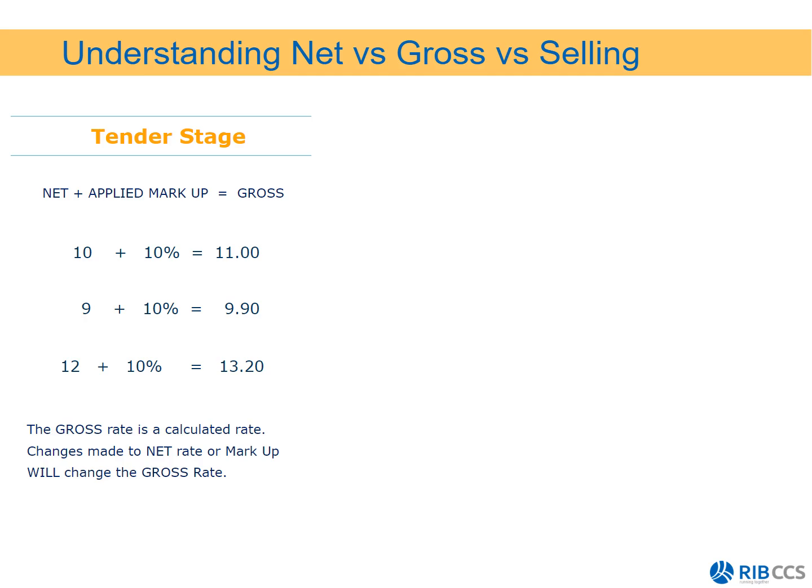Now, the gross rate, as I mentioned, is ideal for tender stage, as if you make any changes in your worksheets, you adjust any of your net rates, the gross rate will automatically be updated, and you can then use that to send to your client.